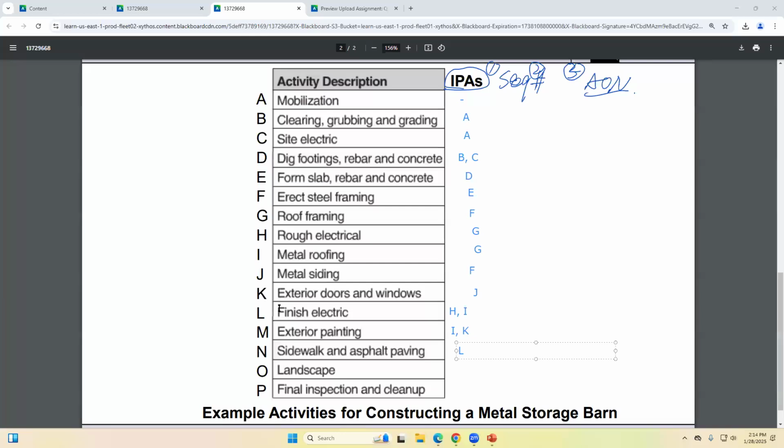Am I supposed to think residential? This is residential, or you can see it as commercial. It doesn't matter, but this is a small project. When you see a job site, they already do the cleaning, put the building over there, put the pavement last, and then put the grass over there, right? Yeah, that's the order.